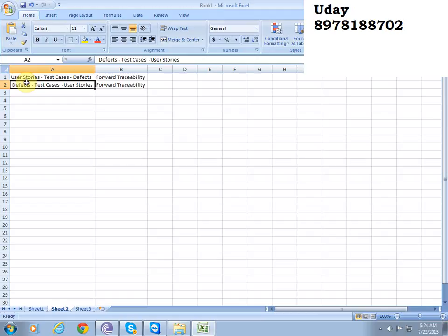Okay, let's say to fix the defect it's taking 20 hours. Our sprint is only 2 weeks, which is nothing but 80 hours ideally. So if fixing a defect really takes 20 hours, then it doesn't make any sense for us to go for fixing the defect, because there are other entities which need to be developed in that particular sprint.